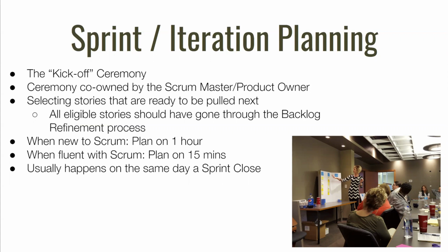In fact, if there's any question about anything that starts to kick it over 5 minutes, they know that that work is not ready for this sprint. It gets punted back in. They'll take that story back into their next group of backlog refinement activities, and they'll make sure that it's ready to go for the next round. But the product owner and the team are so in sync on this, on making sure that they don't impact the sprint's capability to work and the team's ability to deliver on their commitments, that anything over that time frame doesn't work. So typically 15 minutes with a very fluent team.